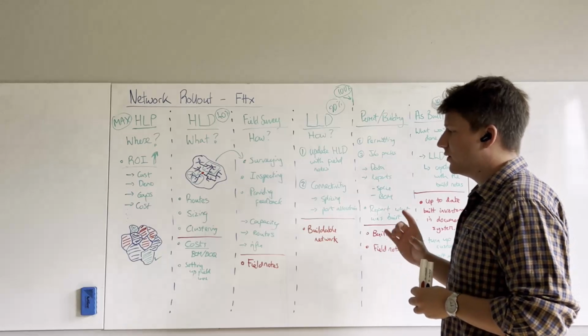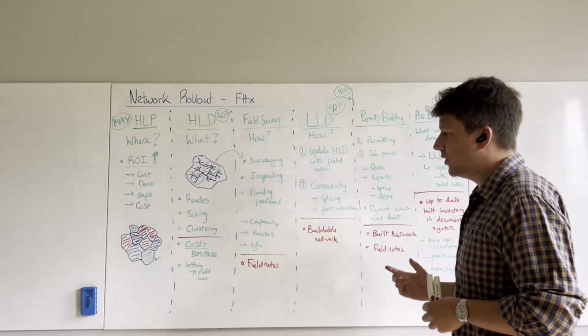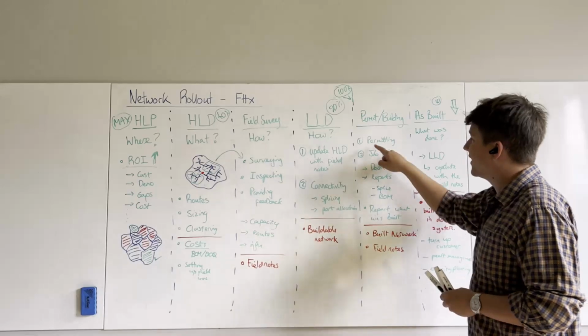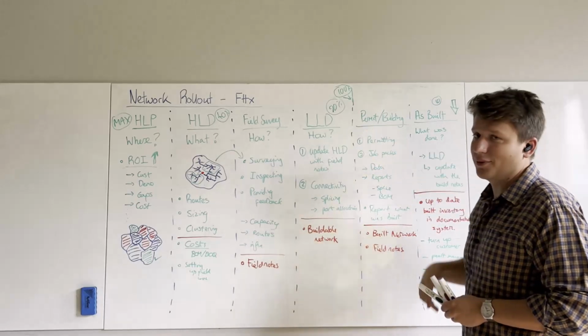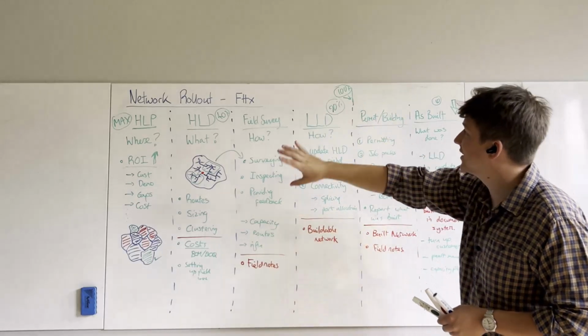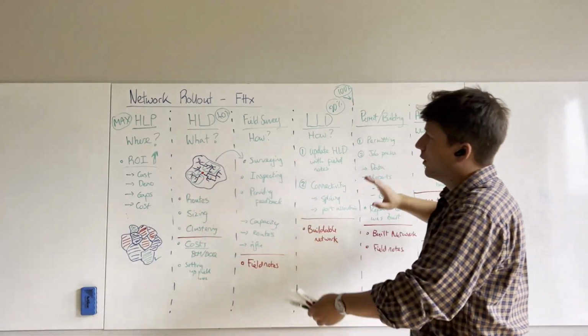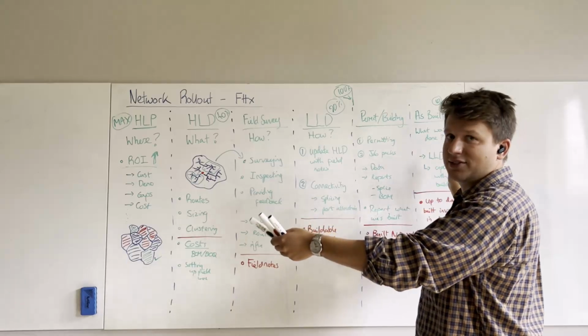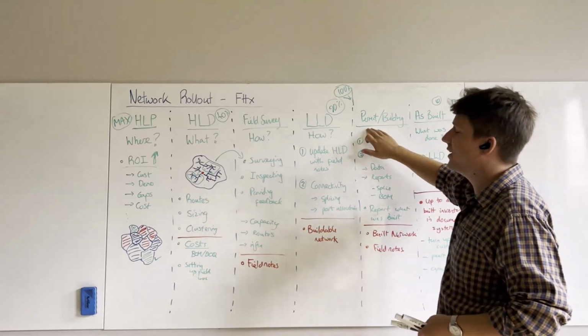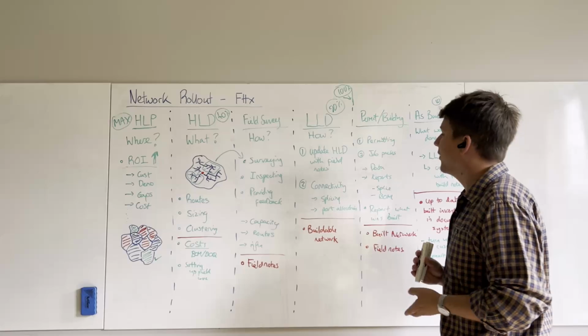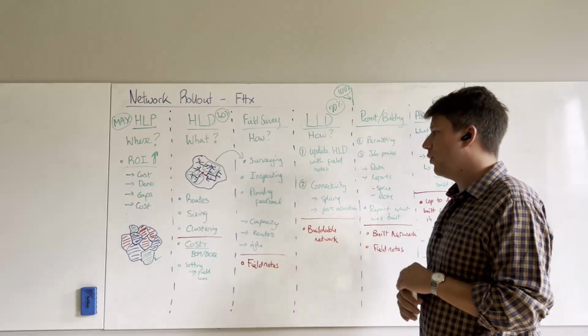And it's really in those little things we've found that you can do that make a big difference. Standardizing permit documents, for example, sounds small, but makes a real difference to this end-to-end process. It can make the end-to-end process a few months rather than 6 months, because the permitting bit is probably the slowest bit in the whole process, right? So just some food for thought there.